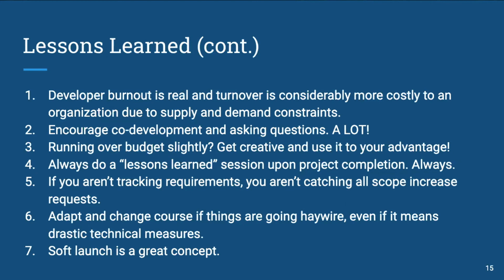If you aren't tracking requirements, you aren't catching all the scope increase, period. If you aren't constantly looking out for scope increases and tracking them carefully against the existing scope, you are doing yourself a disservice, and you are probably doing work for free.